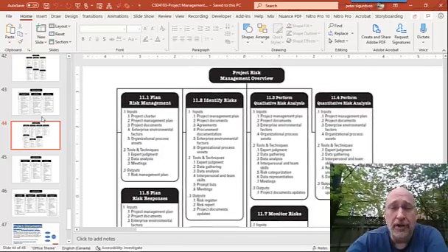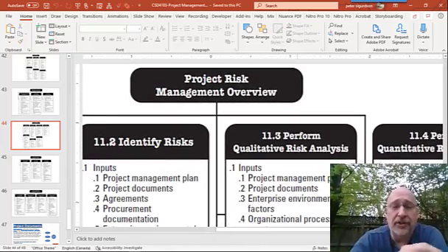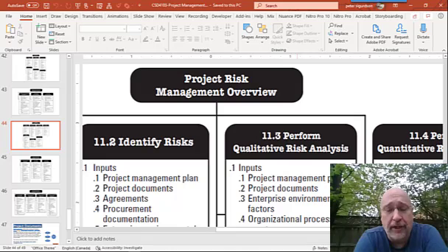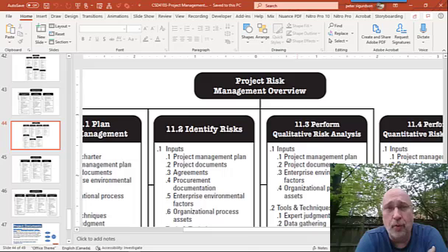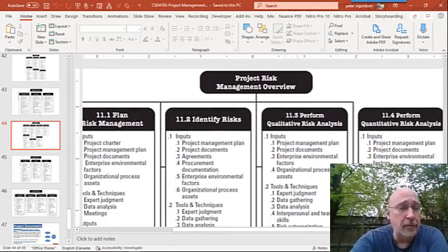And there you have risk. So what are all the potential risks? And in the Word document, in the summary at the end, I give you examples of some risks, but you could think about that. So commonly with things like this, risks might be that you fail to research and secure proper government permitting. You don't get the city permits and all that stuff, so you aren't able to open on time. And if you've already rented the warehouse and hired the people, you have a risk that you're going to be paying people who can't work because you can't start your operations yet. So we think about risk management in a project.